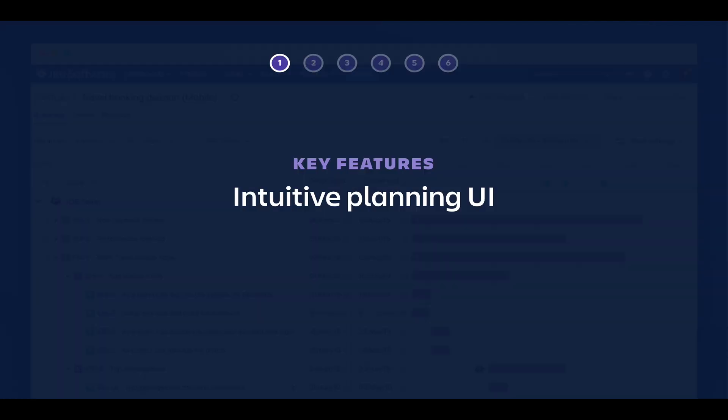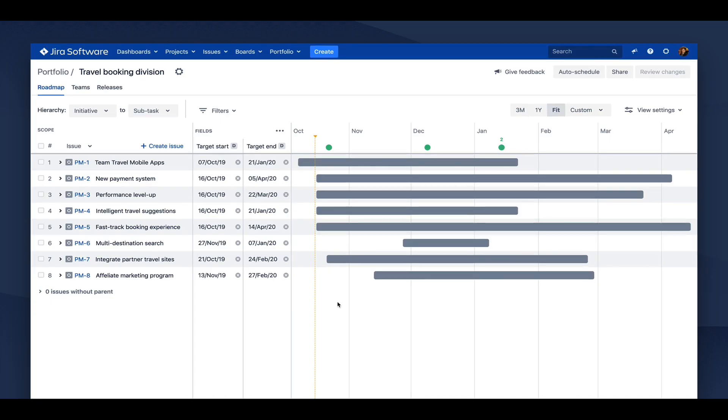First up, an intuitive planning UI makes it easier to see and manipulate data that powers your roadmap. Just for some context, Portfolio is split up into three main tabs: Roadmap, Team, and Releases. Here we're looking at the Roadmap tab, which is where you spend most of your time managing your roadmap. The hierarchy we can see here are initiatives. That is a level above Epic that we've set up thanks to Portfolio. You can set up as many levels of hierarchy as you need using Portfolio.